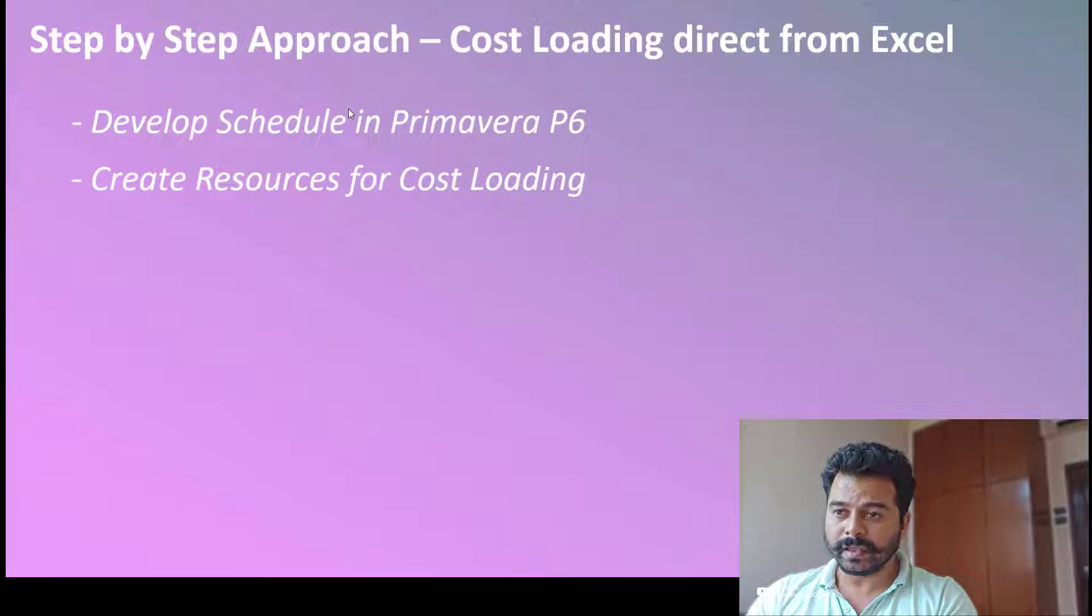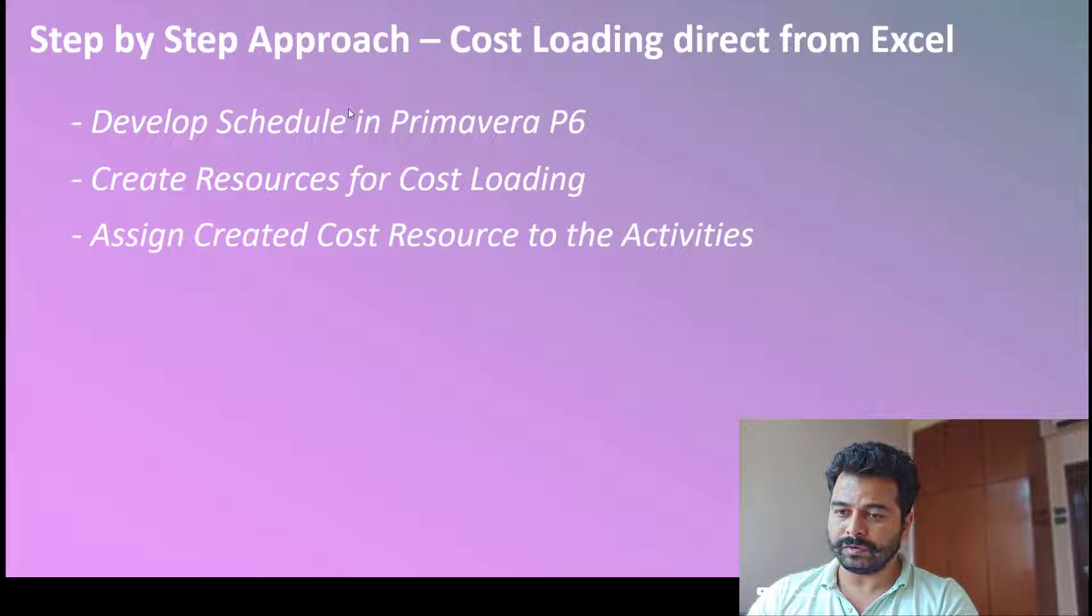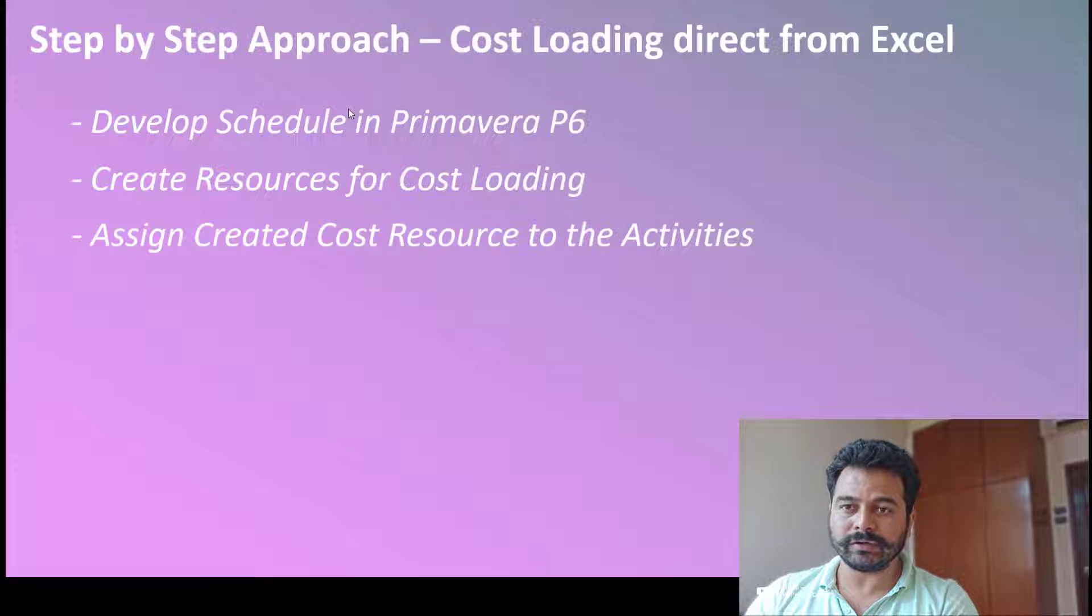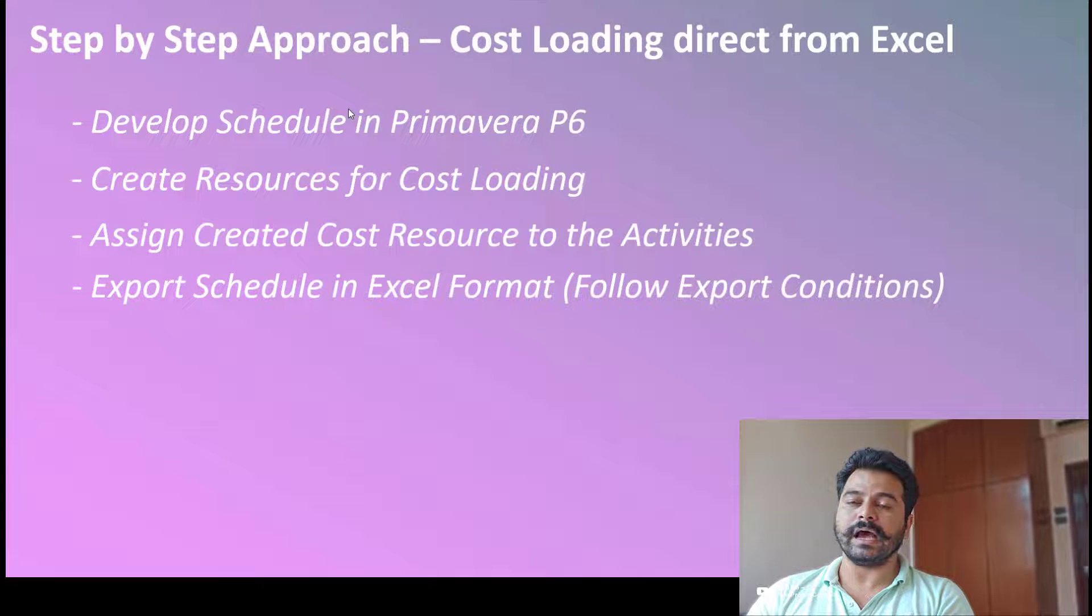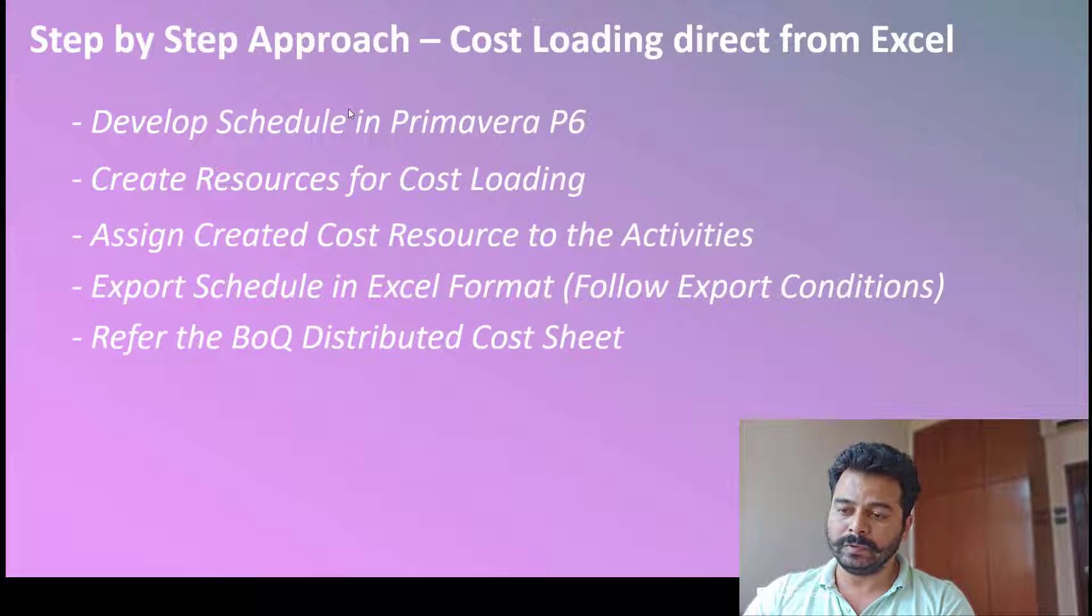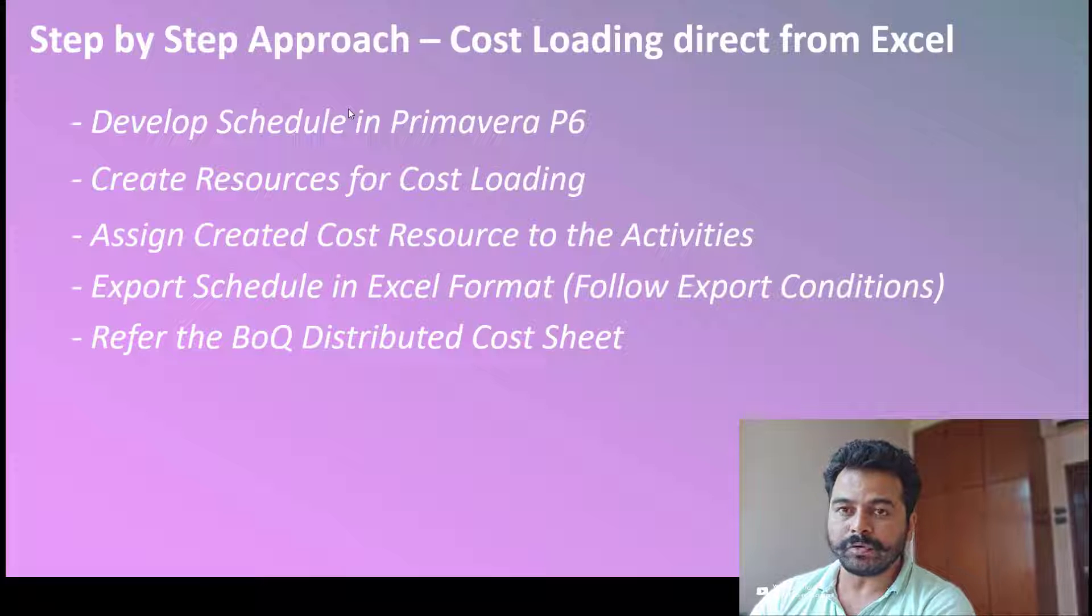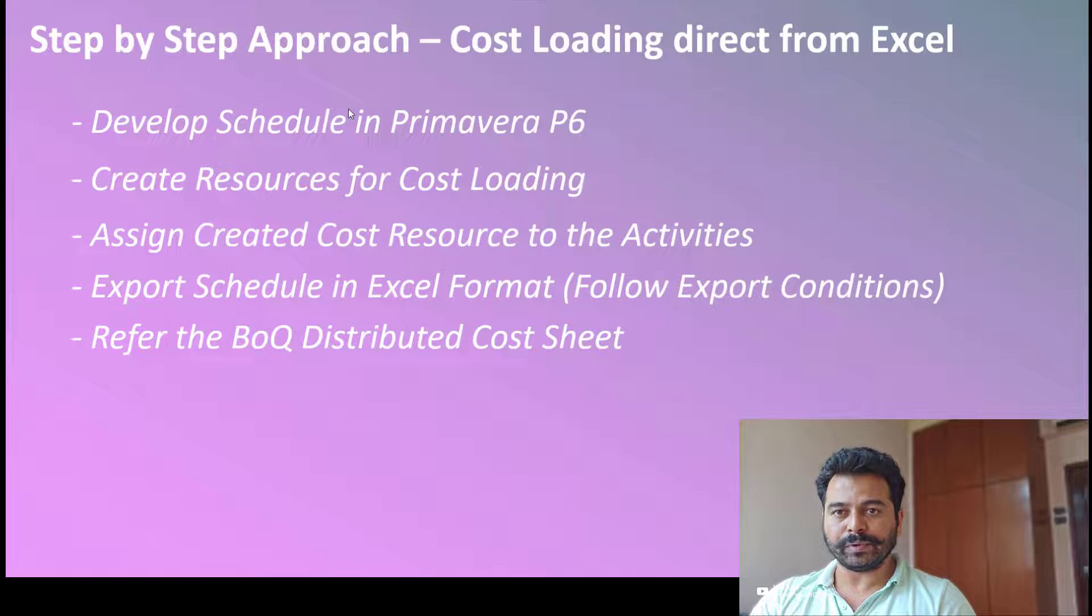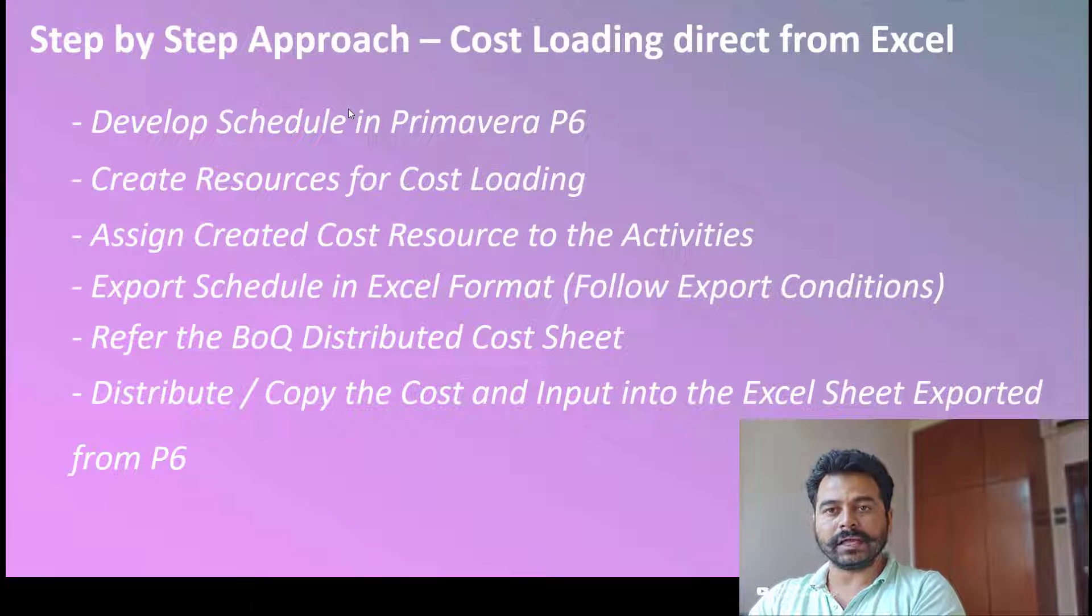There are certain aspects to consider, like the unit rate. After creating resources, I'll assign this created resource to all activities which require cost loading. Once the resource is assigned, I'll export this schedule into Excel format following certain export conditions which I'll show you. After the schedule is exported into Excel, I'll refer to the BOQ distributed cost sheet, then copy the cost from the BOQ and paste it into the P6 exported Excel sheet.